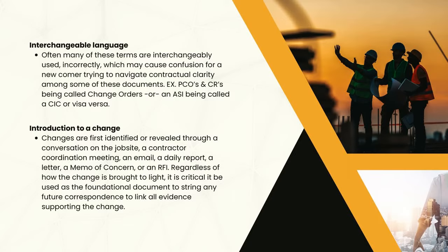Changes are first identified or revealed through basically a conversation on the job site. "Hey, we have a problem." A contractor coordination meeting is going to bring up some of those issues. Maybe it comes in an email, a daily report, a letter of correspondence, or maybe even a memo of concern from the inspector. We'd like to be able to see it come in the form of a request for information